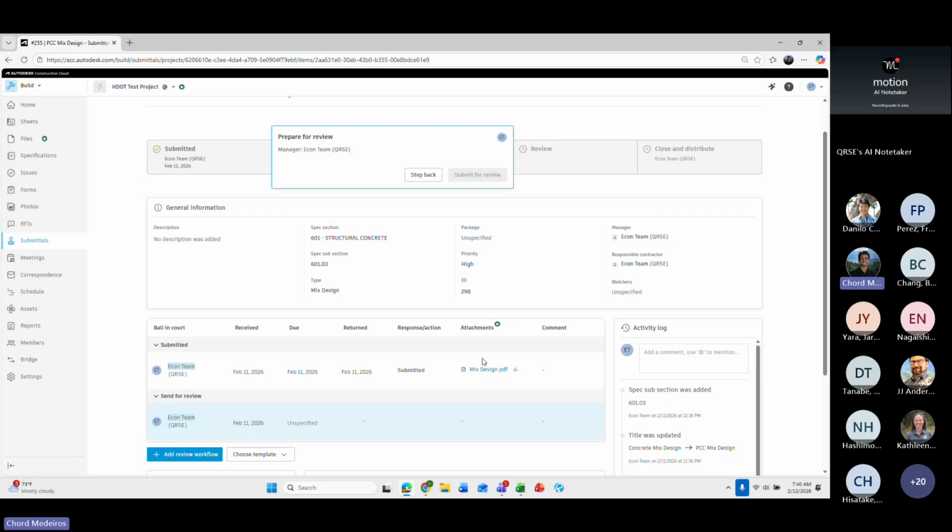Another thing, obviously, with all COCs and mix designs, and I know Lab is a stickler for a right reason, is making sure that all material certification documentation is certified within a year, right? So immediately, if I see something that's not within a year, I will send that back. Because let's say that we need to send something to the engineer of record before we send it to Lab, and the engineer of record takes a week to review it, and then we send it to Lab, and they take a week to get to it, which happens in most cases.